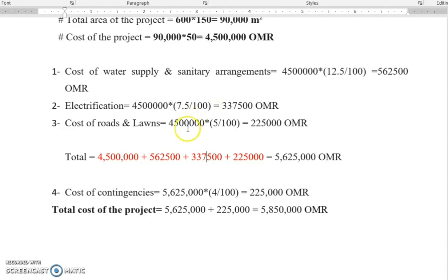So why am I saying that? Because you will be asked, and you will need yourself sometimes, these components of the total cost. The other thing is that sometimes we are doing, as we said, value engineering. We are doing something where we just want to reduce the prices. So we want to know where the most expensive item lies.